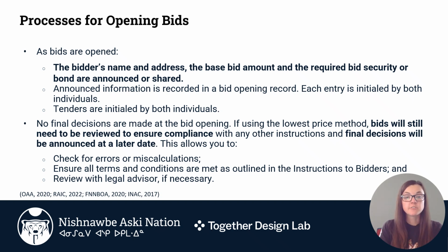This allows for you as the project manager or housing manager to check for errors or miscalculations, ensure all terms and conditions are met as outlined in the instructions to the bidders, and review with legal advisor if necessary. Even in the lowest price method, you cannot announce the final decision because you need to carefully review and ensure all components of the bid are present.